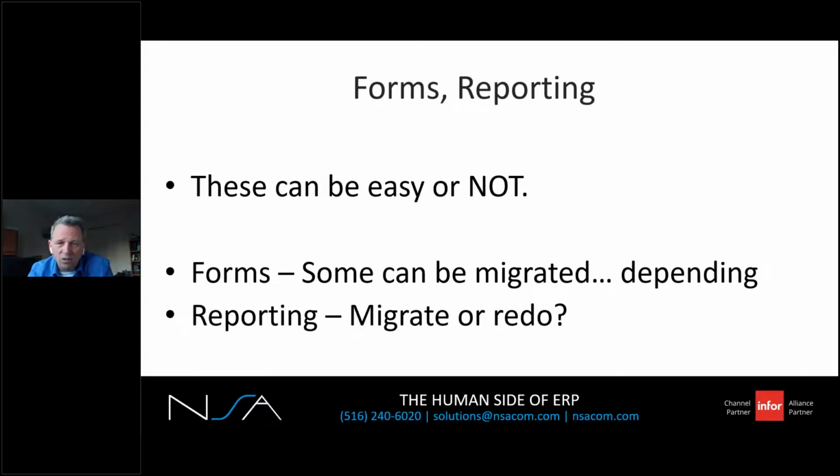Forms: pick notes, packing slips, invoices, statements, purchase orders. I could go on and on. Start early. Many people leave this to the end. Get your intro training on forms. After that, print out your CSD forms, compare them to your current GUI forms, and get the Sharpie out and start marking them up. And when you've decided you've got to make changes, you can bring them to a workshop, let's say for your training, go through them and get some help.